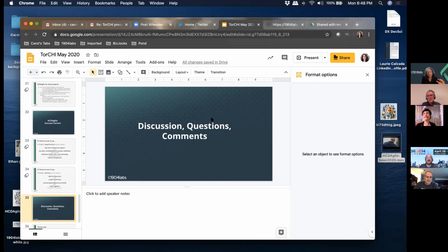The HCD points are not Fibonacci, they're based basically on the reality of a sequence of HCD type activities. So the smallest thing you could do in HCD tends to be sort of like an expert evaluation. And you can do that in 4 hours. Well, what's the next biggest thing you could do?